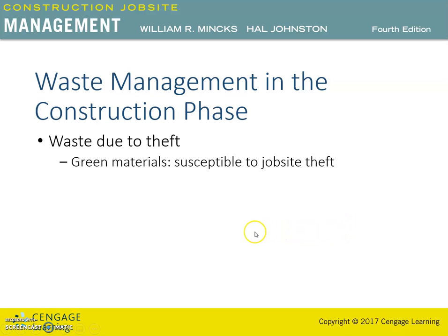For the waste due to theft, many of the green materials used in construction are expensive and not readily available, making them susceptible to job site theft. When implementing job site security systems, emphasis should be planned for the green materials. Theft and vandalism will create unanticipated waste that will cause extra costs and delays. Today's site surveillance is relatively inexpensive and effective, using internet cameras and wireless technologies.